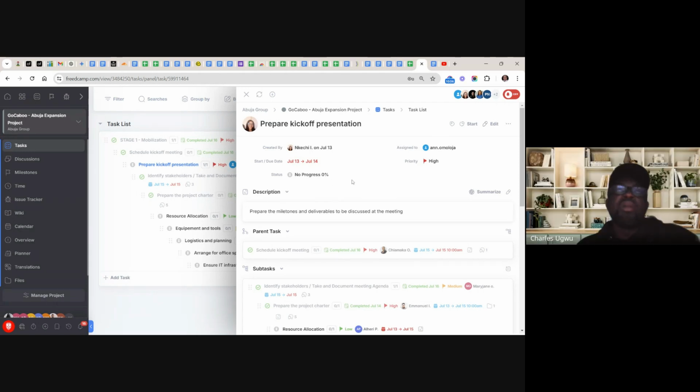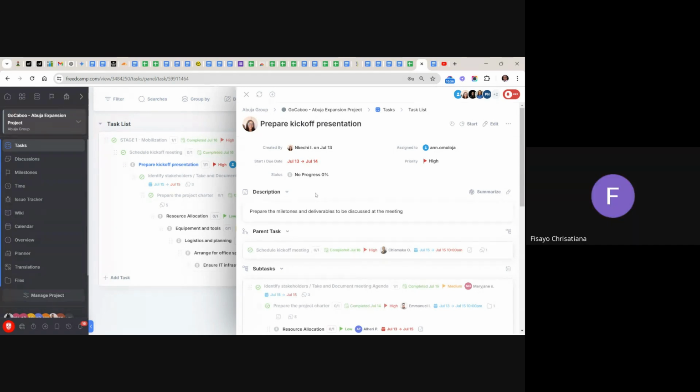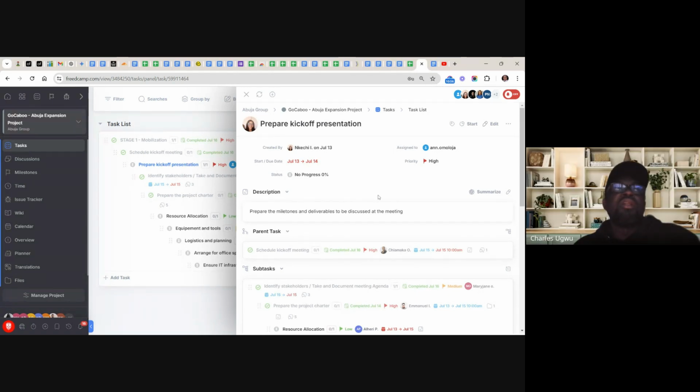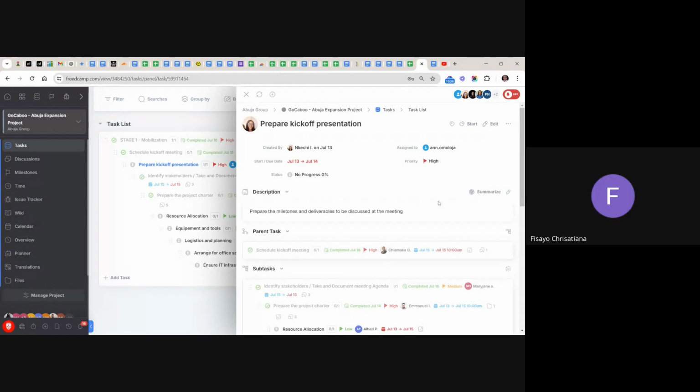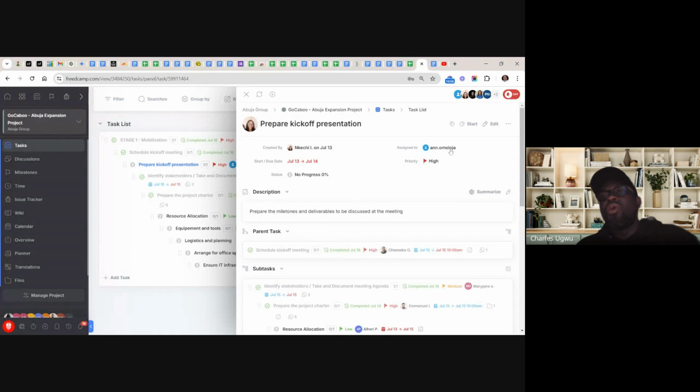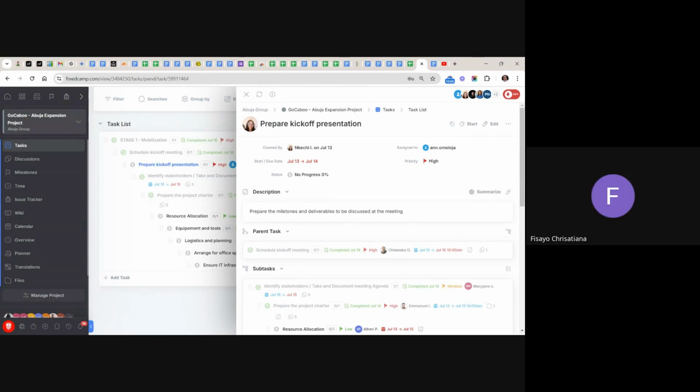Not the person doing the job, but the accountable person is supposed to update the report and the progress, so that we understand authoritatively where we are. I've been in a situation where people don't do anything, they just go and update the report and say they finished their work when they didn't actually do anything. But in terms of others can do something and she cannot, and all of you are on the same privilege, that is a different ballgame.